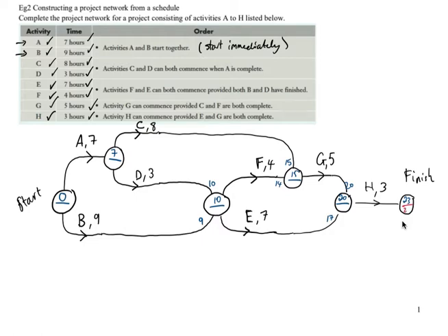We always match that, and that circle maybe was a little bit small. 23. That's a 20, 20 I should say. It's a 15 there. This one has 2 going into it, so it's either going to be 13 or it's going to be 11. So we choose the minimum, which is 11.